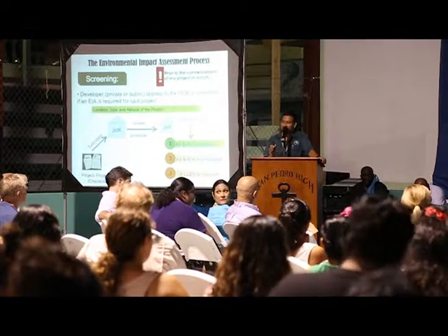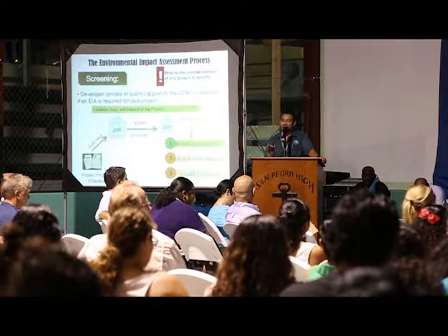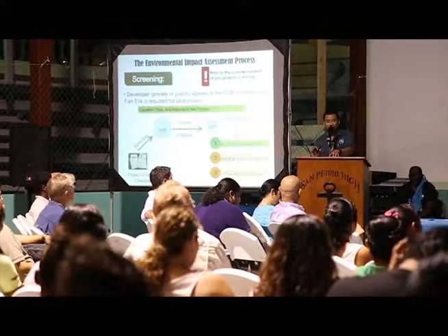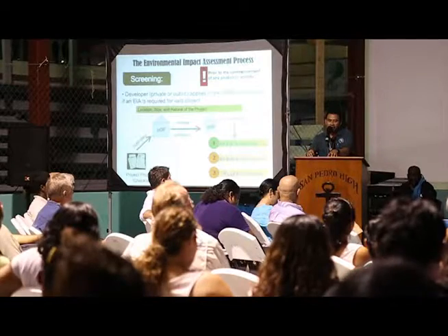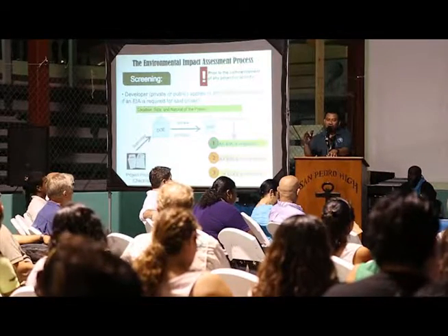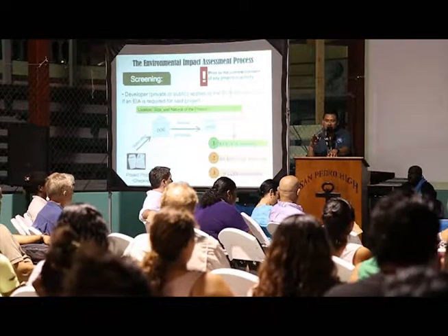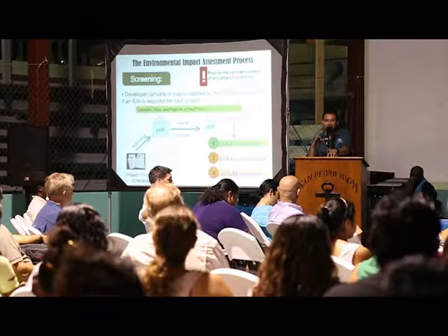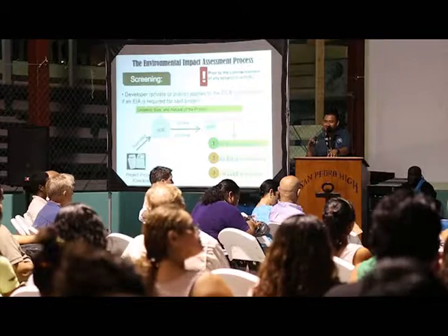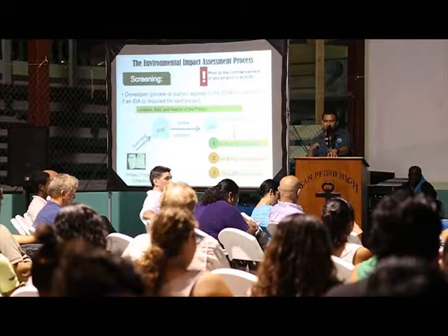There are development projects that are also submitted to the Department of the Environment for environmental clearance, and in the screening process, when it is determined that there's no need for an EIA based on criteria in reference to Schedule 1 and Schedule 2, and there's no need for a limited level environmental study, clearance can be granted then through an environmental compliance plan and or an environmental clearance letter with conditions. I must state clearly here, the ECP in itself is not environmental clearance. The environmental clearance is a clearance letter which makes reference to the environmental compliance plan. So the environmental clearance is a letter. And all of this is within the legislation and it's defined. So for the students who are present, I hope that I've covered up to that aspect for you.